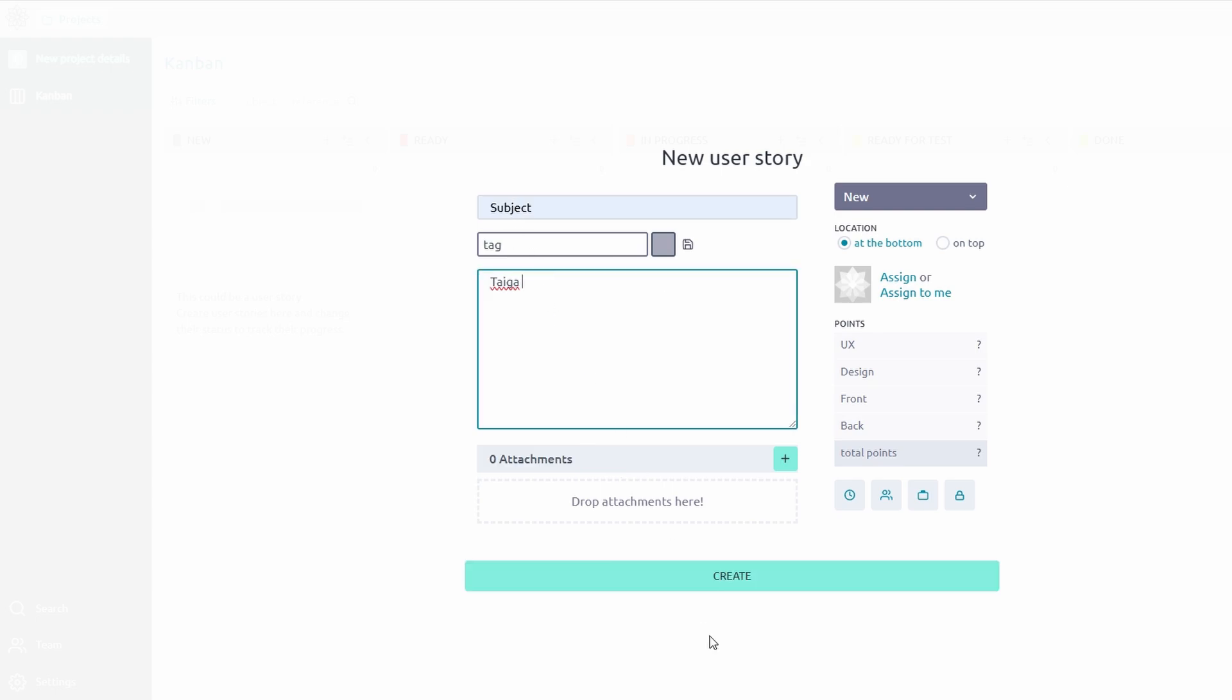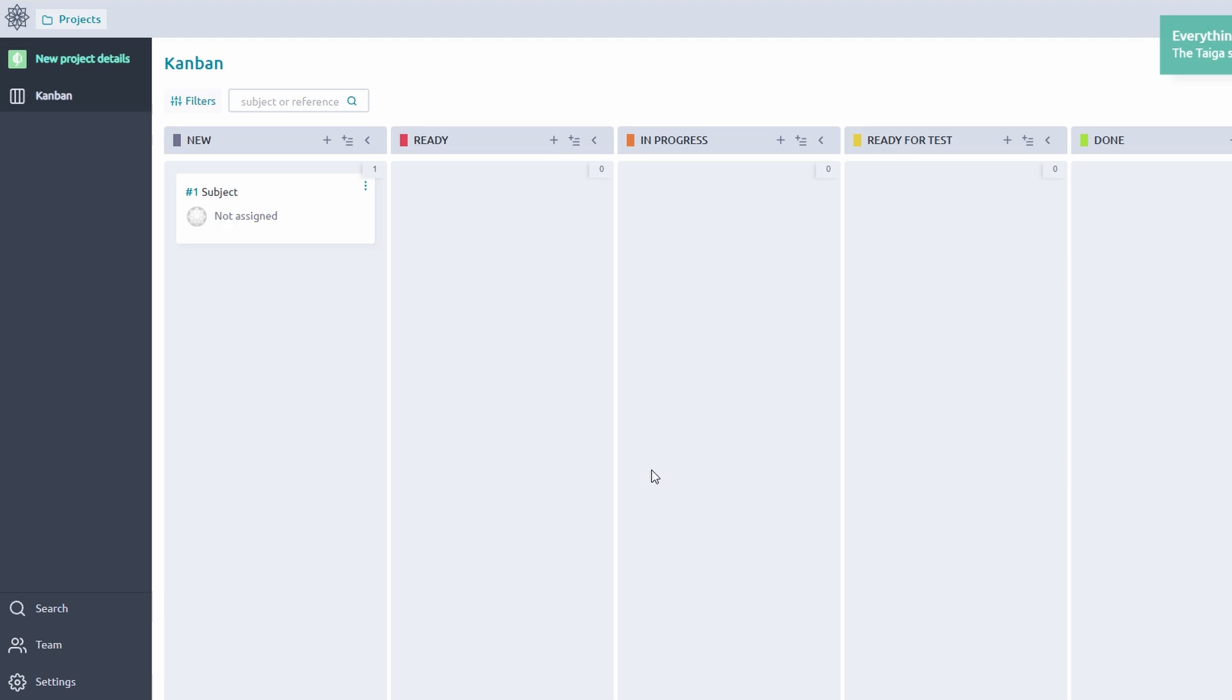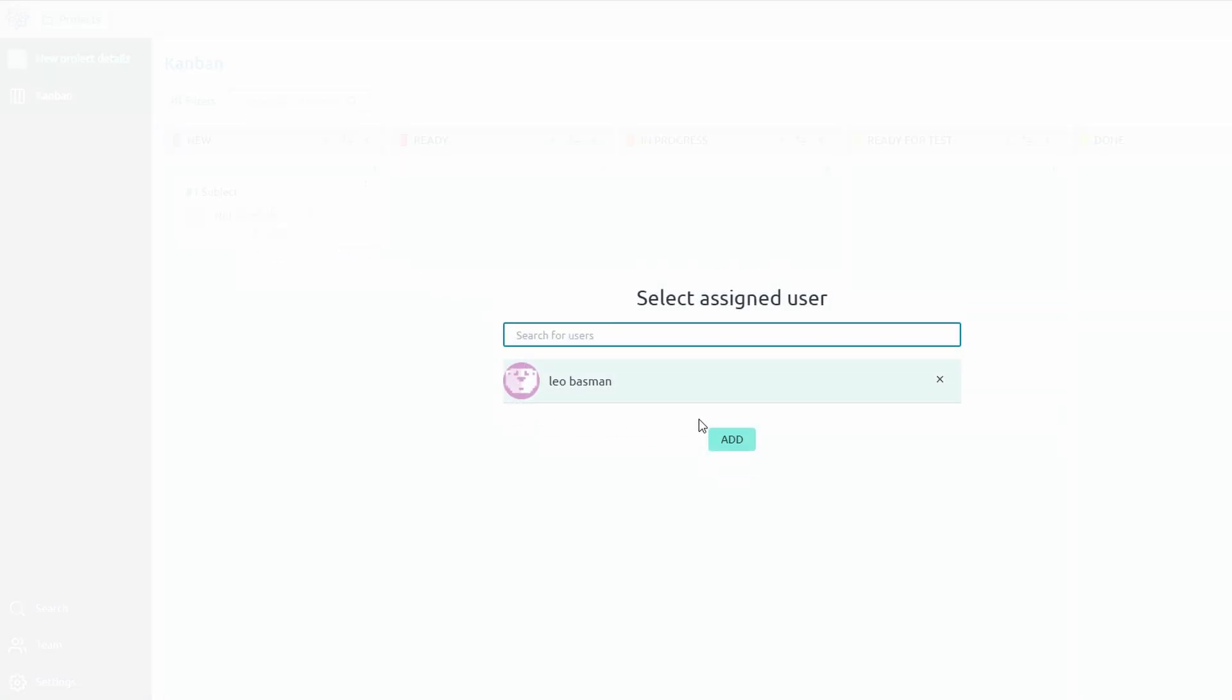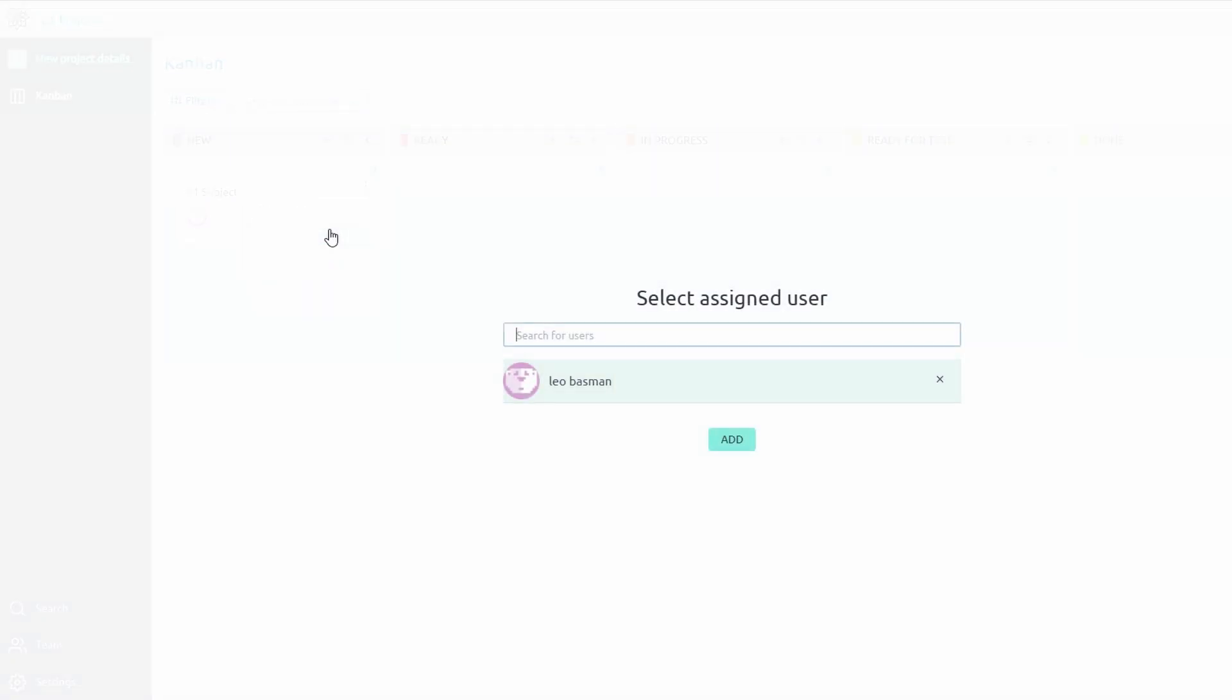Once you've created a task, the next step is to assign it to the right person. Simply click the Assign To option and select the team member responsible for completing it. For instance, if the task is Design Social Media Graphics, you might assign it to your graphic designer. Additionally, you can add watchers, team members who want to stay updated on the task's progress without being directly responsible for it.